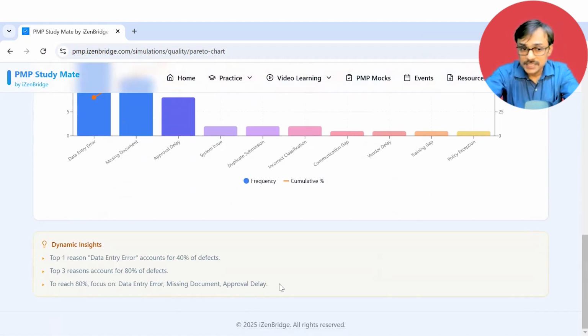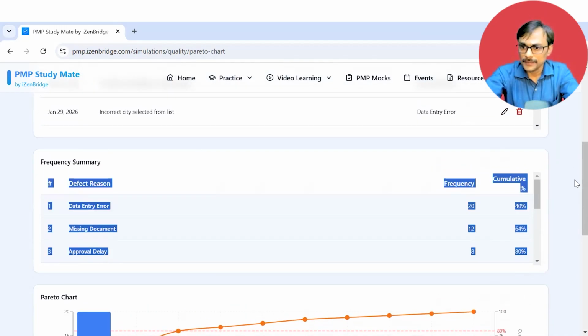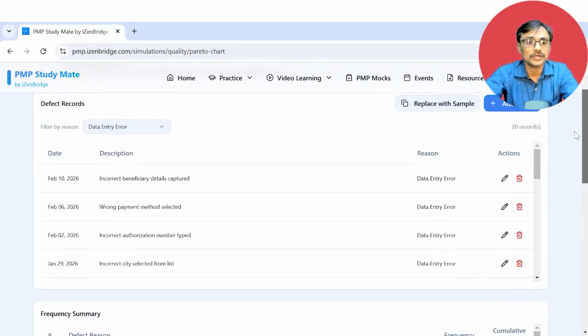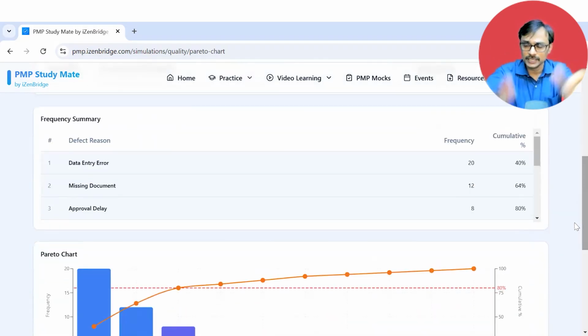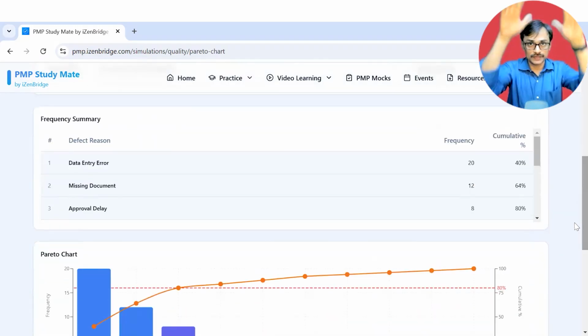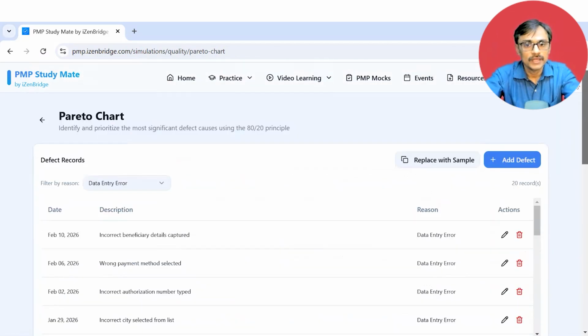Here also we show some insights so that you can develop the understanding of Pareto chart. Again, in your day-to-day work, you will be doing far more complicated analysis, but this is how you can visualize how the raw data, like defect data, gets filtered and analyzed into category-wise data. You can say pivot table in case you are visualizing an Excel sheet. So you have defects, you put categories there, then you create a pivot table. From a pivot table, you create a bar chart, then you order the bar chart, and that is your Pareto chart. Yeah. So this is your second tool.